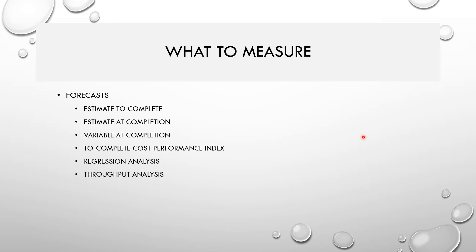Forecast-related metrics help you predict future performance. Estimate to Complete is the additional budget needed to finish the project, calculated by comparing actual cost against budgeted cost using the Cost Performance Index or Schedule Performance Index. Estimate at Completion is the total budget the project is projected to require — you take the actual cost and add the new estimated additional budget to arrive at this figure.